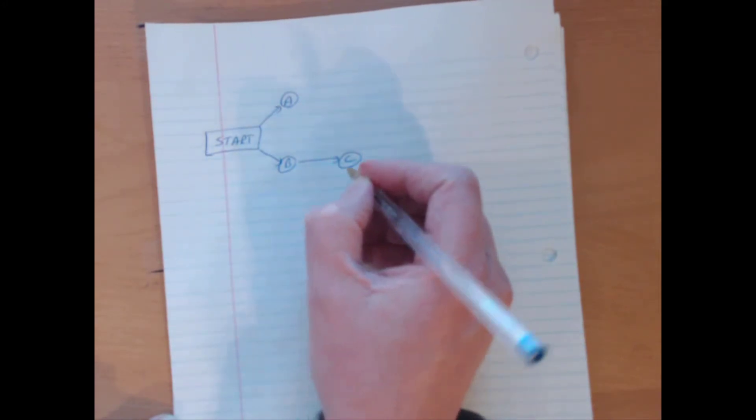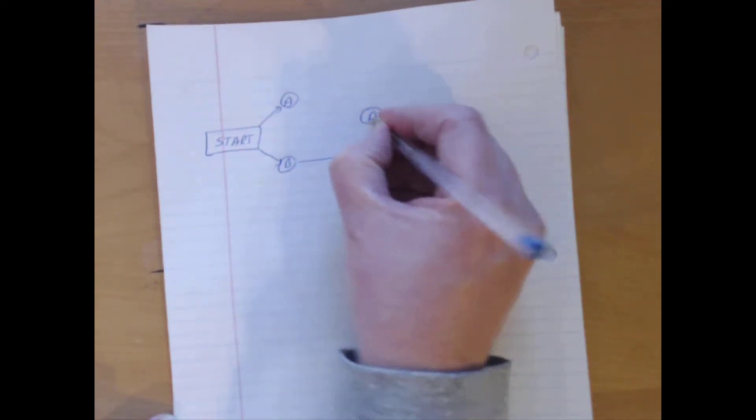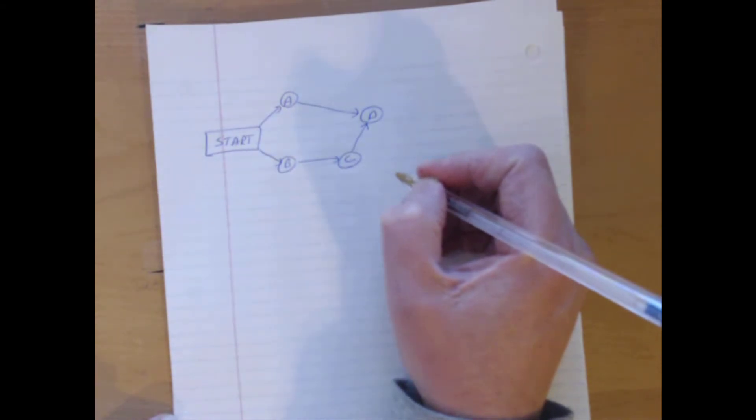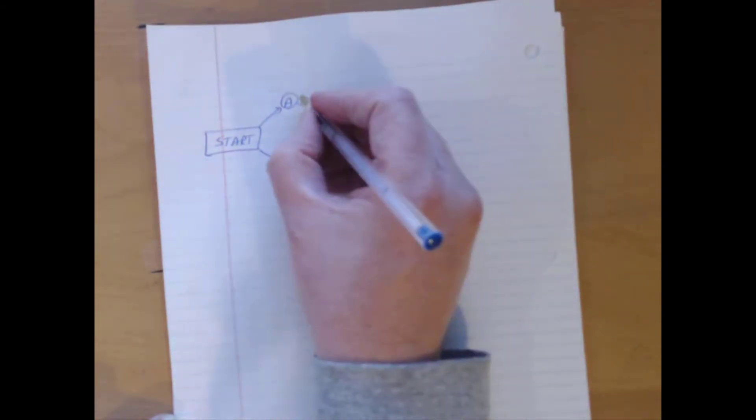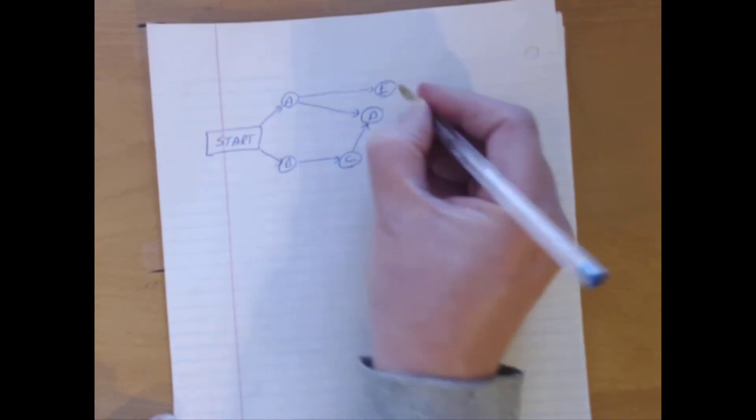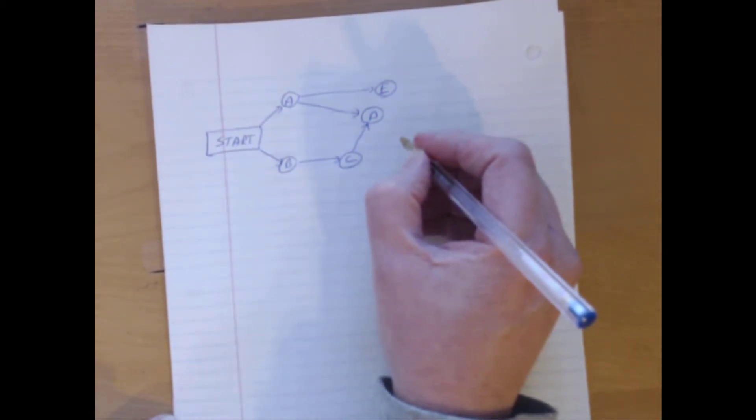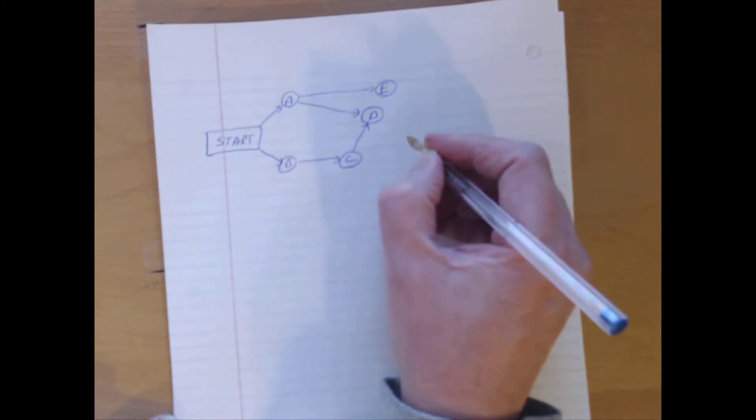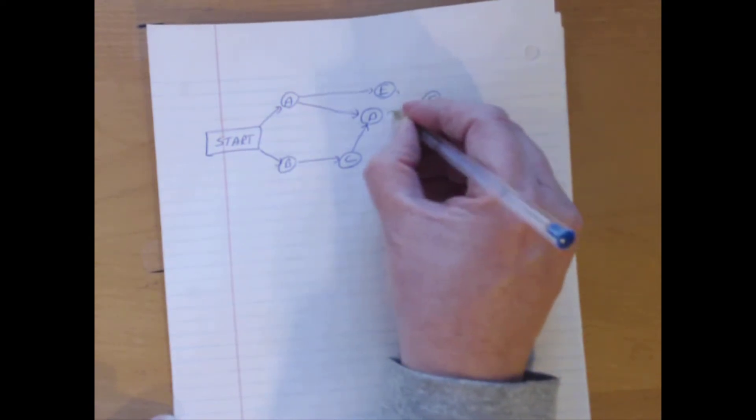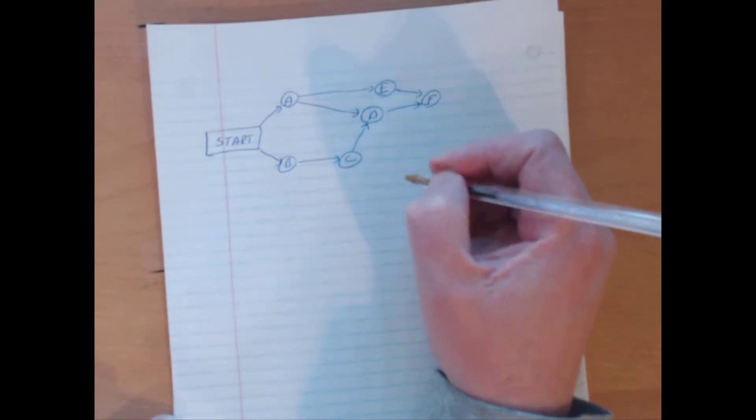D requires A and C. Let's put someone in the middle there. C needs to be done and A needs to be done. Then D may begin. E depends just on A. Let's go straight to there. E just depends on A. And then lastly I see F depends on D and E. F depends on D and depends on E.